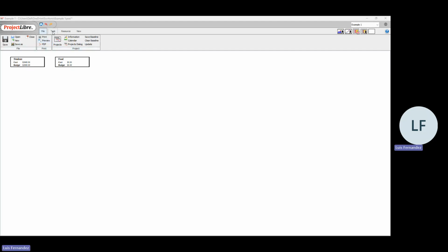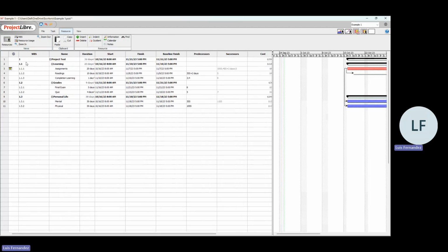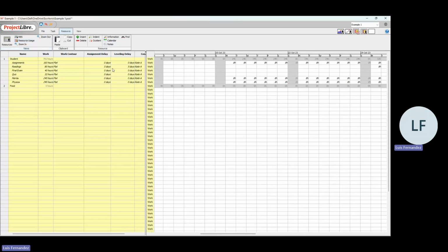What does it mean? Well, maybe if I don't want to see everything critical, like I'm having here, I can go to the resource usage and start pushing the activities to have a decent amount of hours. If you want to set it as 12 hours, 18 hours, 8 hours per day, if that is your daily threshold, 8 hours, well, you need to explain it and justify why you decided to modify the whole schedule by pushing those activities.